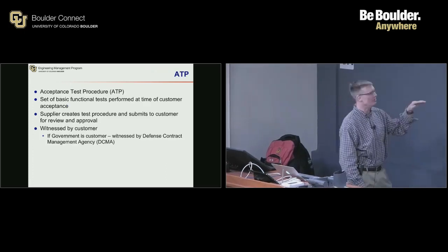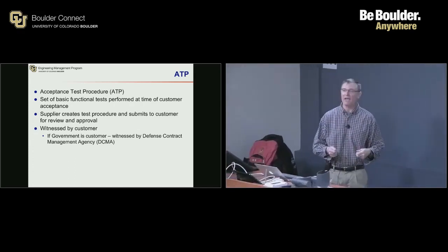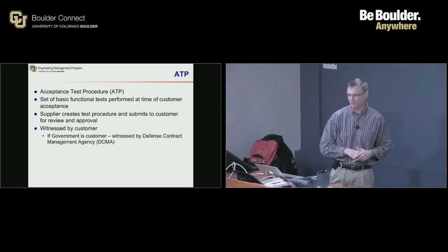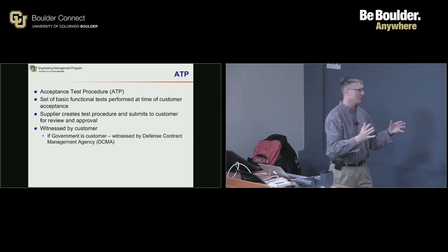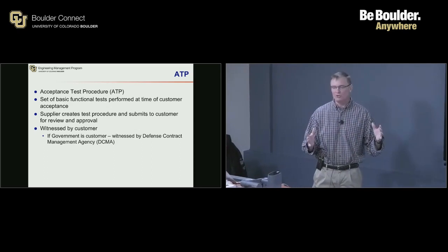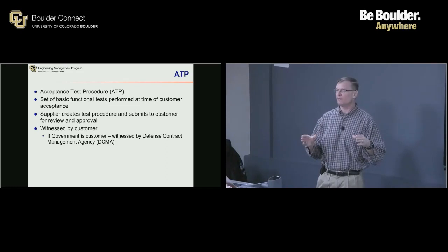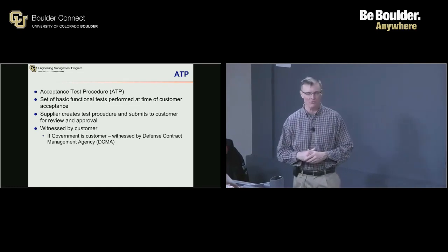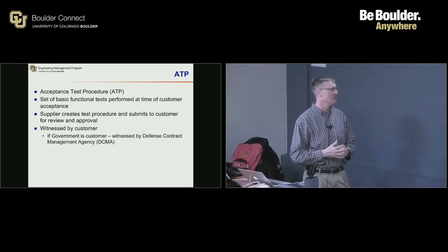All right, your ATP, or your acceptance test procedure. Your ATP is what you have to perform and pass for the customer to say, yes, I will take that and I will pay you for it. So it's kind of like your final exam before the article goes out the door to the customer. It is generally not a huge amount of testing, because the customer doesn't want to pay for that either. But it's enough testing for them to be sure that the thing they're getting works when it came out the door. So it'll be some sort of a series of basic functional tests.